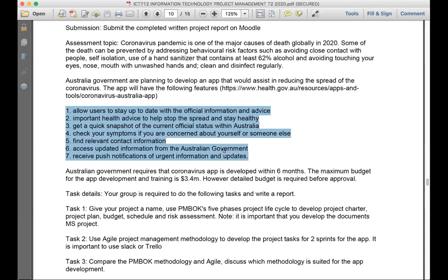If, for example, you use a machine, you have to put that machine as a resource for that task. You might say, for this machine, we're going to have a one-time use. Every time we use it, we'll pay $1,000, $2,000, whatever it is. So you have to put all of that information. Risk management, you're going to show me you thought about different levels, different stages, likelihood of occurring times impact of this occurring. I want all of this information to, again, be shown in my plan.